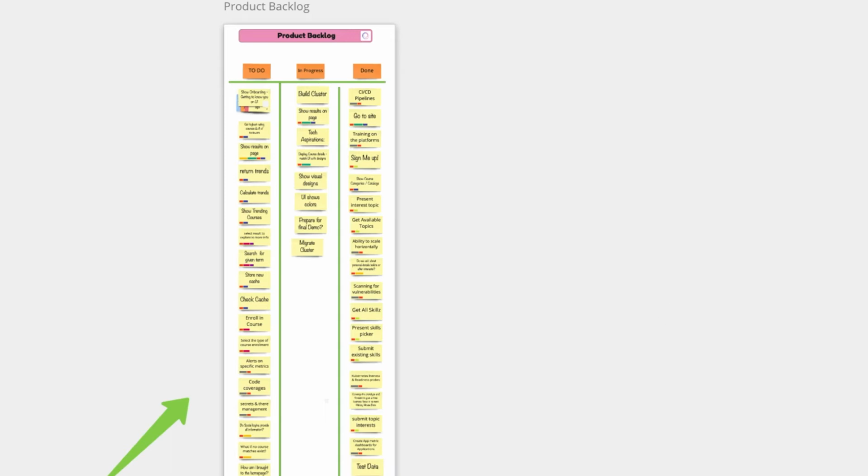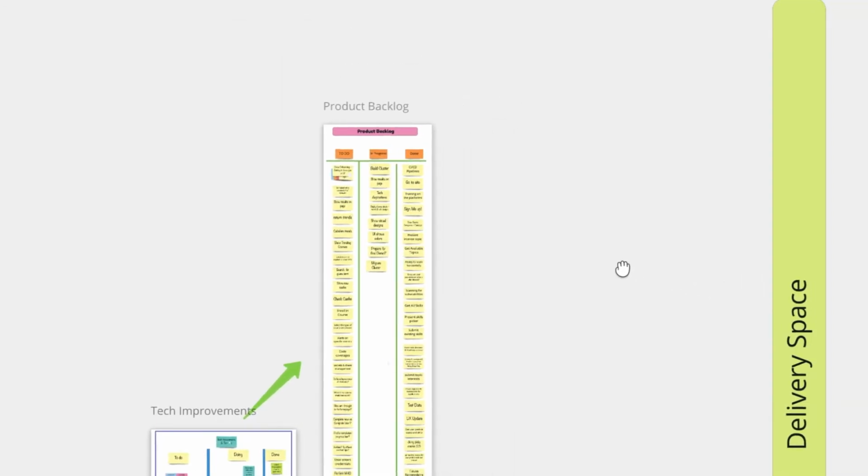The earliest development of it lays out the initially known and best understood requirements. The product backlog is dynamic. It is constantly changed and refined to identify what the product needs in order to achieve the outcomes of the residency. So every week, we pull the most valuable items from the product backlog to create a sprint and decompose the work down into low-level tasks.